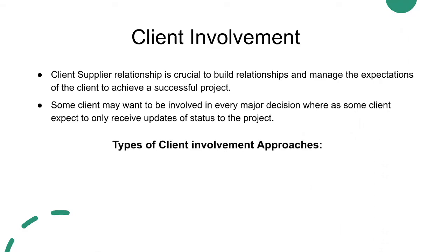Listed are types of client involvement that are formulated at the start of a project to understand expectations. Partnering approach is a joint development process that has a high client involvement. Milestone approach. This approach states that the client gets involved and updated during only milestone periods within a project. Thus, there is a lower sense of client involvement. However, there can be minimal milestones within a project, and a client could revert to pop-up check-ins or additional meetings for updates. This can be cost ineffective and put excess pressure on the task performers.